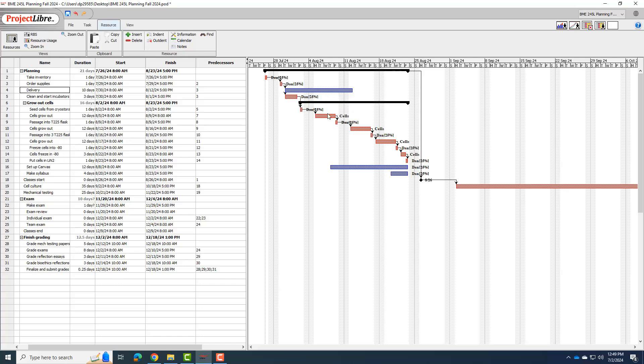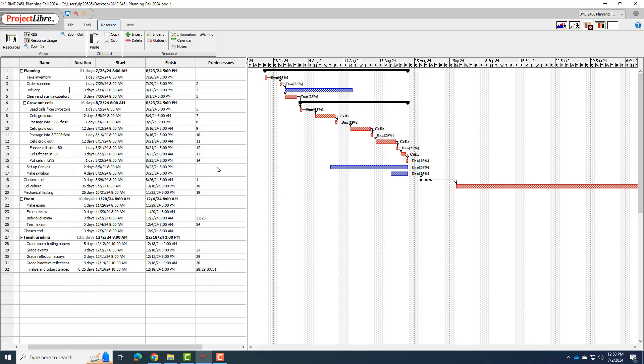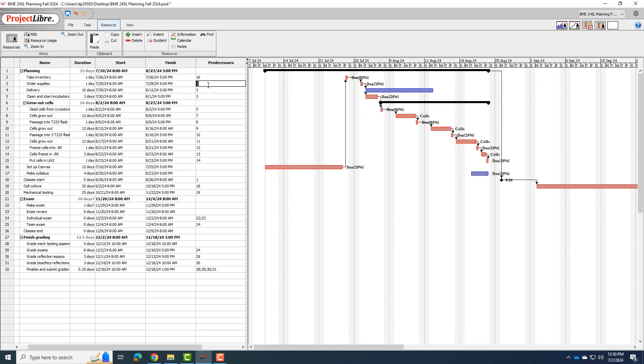Okay, the other ones that I have to fix are setup canvas and make syllabus. And so these are kind of interesting actually, because the only days I'm actually working are the ones I have assigned to Dan. So I actually have a lot of time where the cells are growing that I could do stuff. So this is one of those things that you could really think about how you want to schedule this out. Maybe I could break up the setup canvas task into different tasks and then assign them manually by putting them to the same date as when cells are growing. That's an option. Another option is just say, before I do any of this inventory or ordering, I want to make sure I have my canvas set up. And so that's the easiest thing. I'm going to go ahead and do that. I'll go ahead and say that setup canvas, I want to happen before the inventory. So I'm going to say inventory has to have a predecessor of 16. So that sets me up with setup canvas right through here. Okay, and then we'll go ahead and do the syllabus.